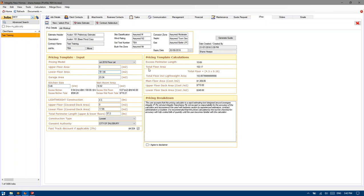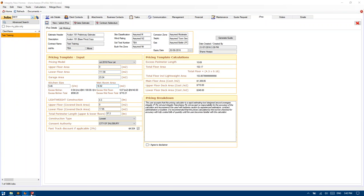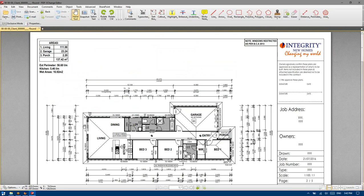So if I change this to 311 just for a laugh, you'll see that for that size home, the client would be entitled to an extra 4.54 lineal metres of kitchen before there would be any additional charge applied.